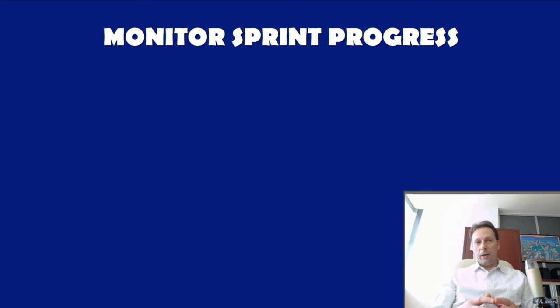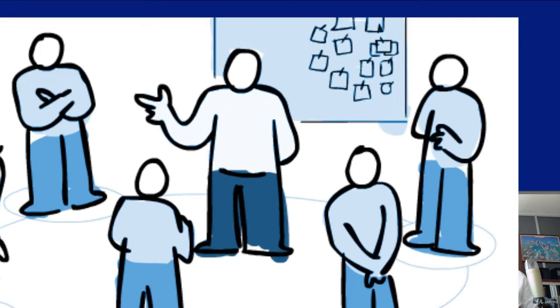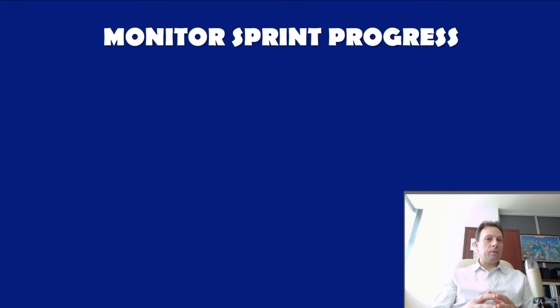Monitor sprint progress. At any point in the sprint, the sum of all remaining work of the sprint backlog can be calculated. The developers track all remaining work at least at daily meetings and predict the likelihood of achieving the sprint goal. By keeping track of the rest of the work in the sprint, developers can manage its progress. Scrum does not consider the time spent on the sprint backlog. It only cares about remaining work and time variables.